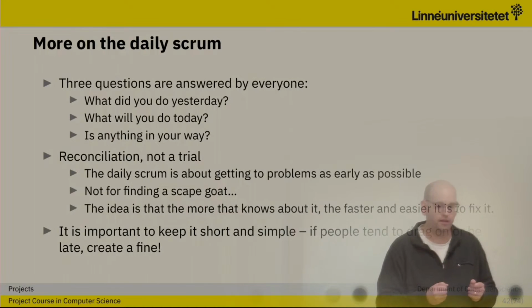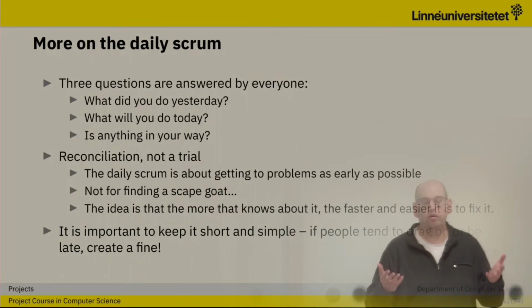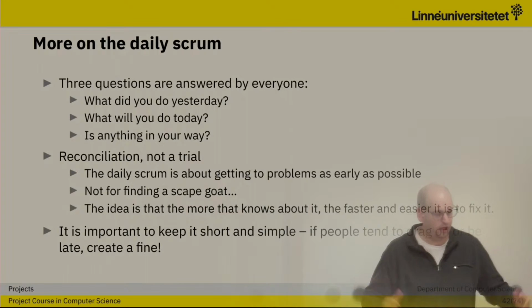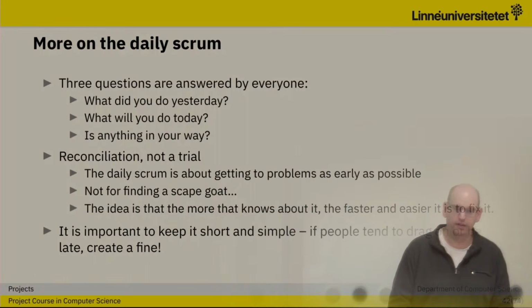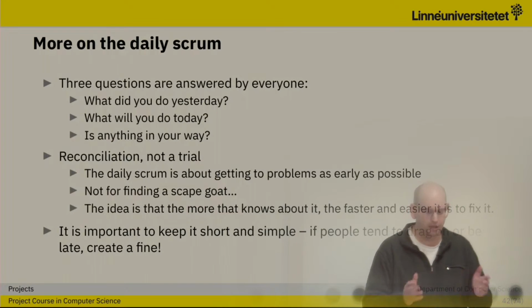We need to rethink. Instead of waiting 3 or 4 weeks, or as is normal, to have a meeting each Friday where you say, well, what have you done? And it's been so long, so everyone just wants to go home, and they say, well, I'm fine. But if you do this 15 minutes each day, and you have to say, well, I'm not quite finished, then it's easier to chip in and help out.